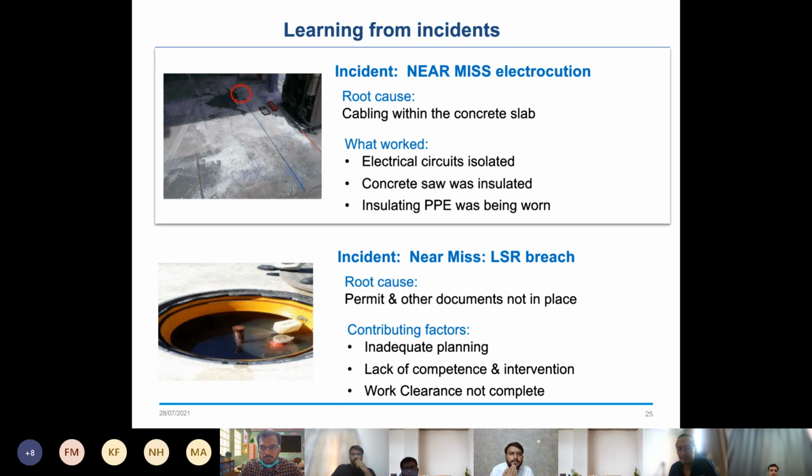Okay. So, what type of incident is that? Like I can see the picture. The photo doesn't show exactly what it is, but what we would like to discuss here is that if, let's say, there is an activity you need to carry out on site and it requires you to issue a permit, this is where you need to have adequate planning in terms of how you are going to carry out the work: by issuing a permit, by issuing a GHA, and by also filling up the WCF in the station prior to carrying out the work.